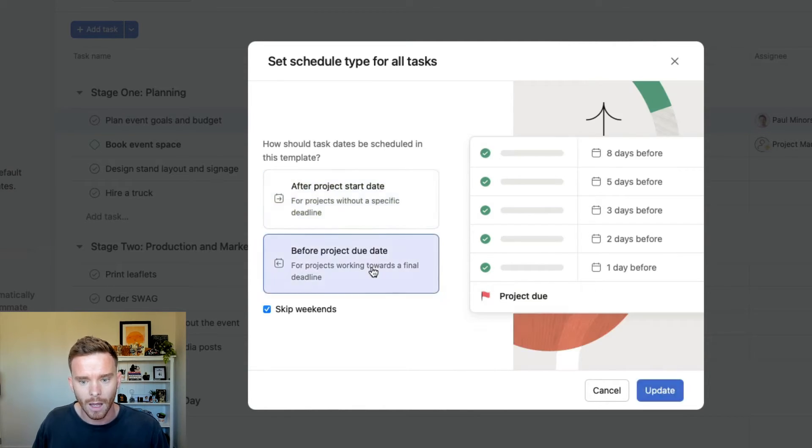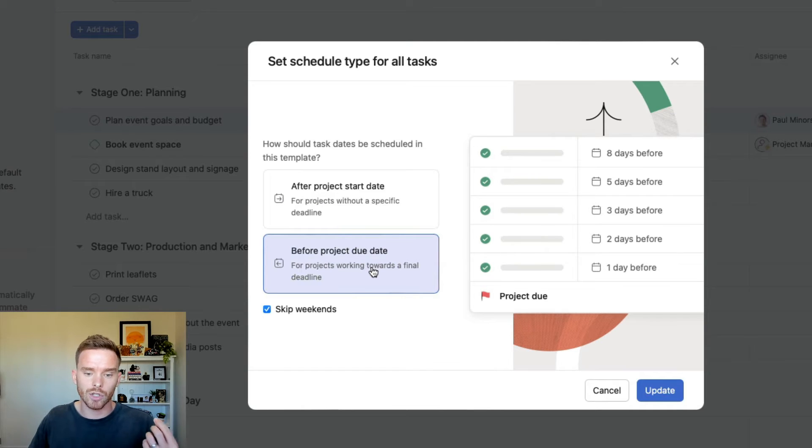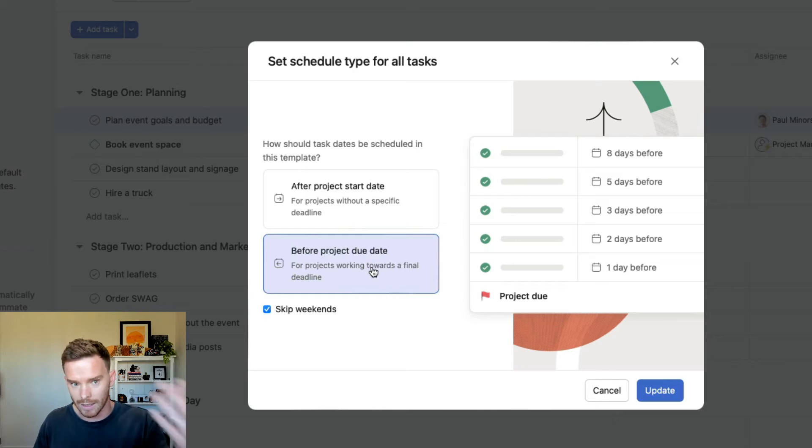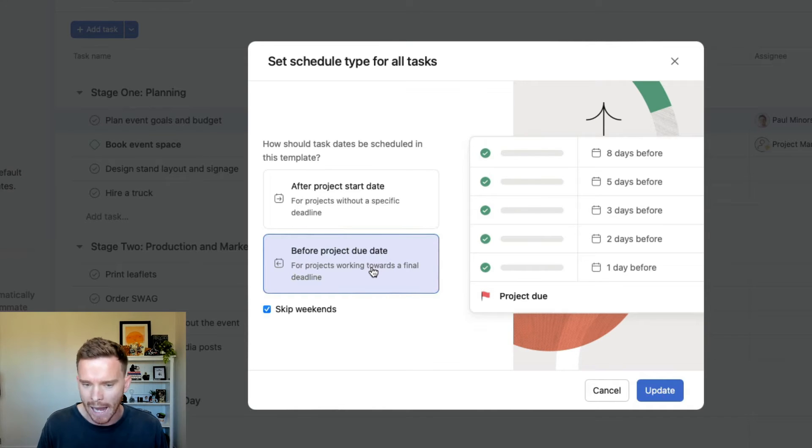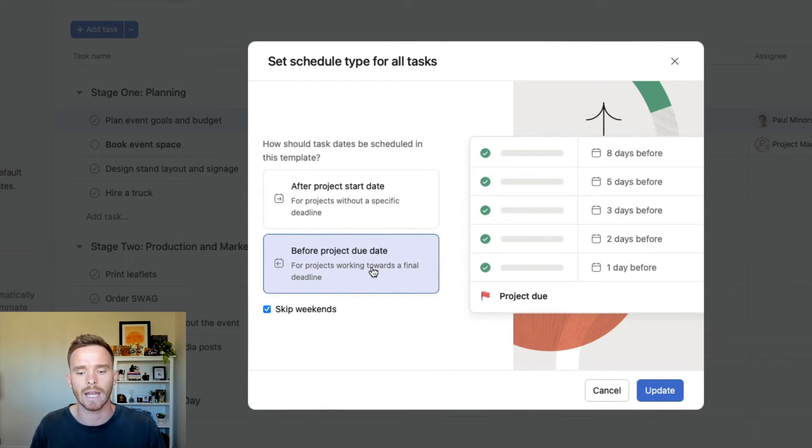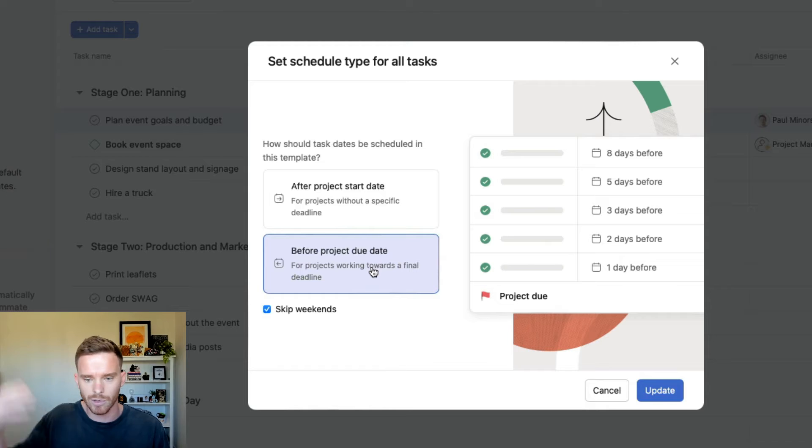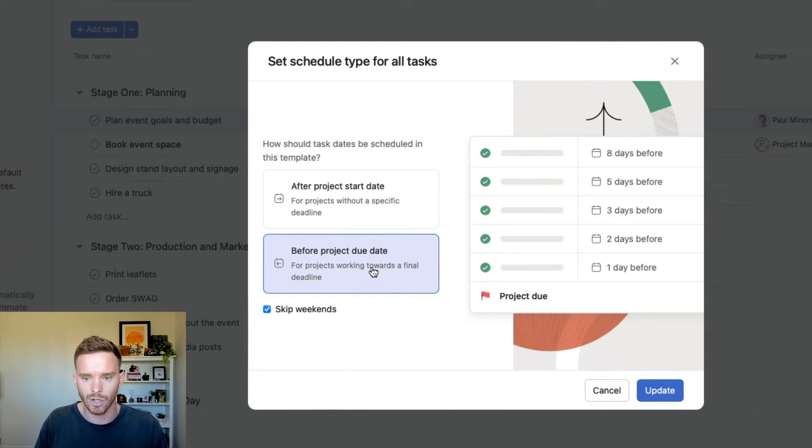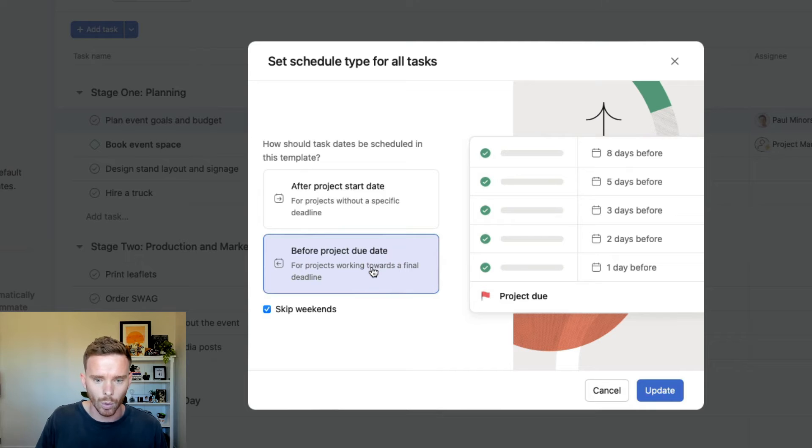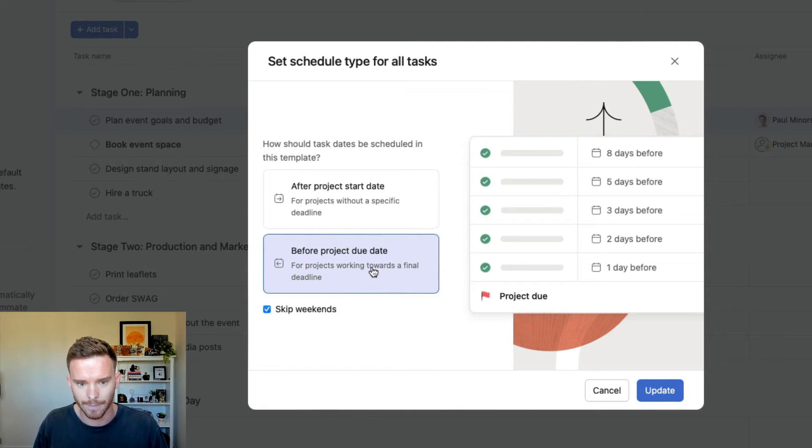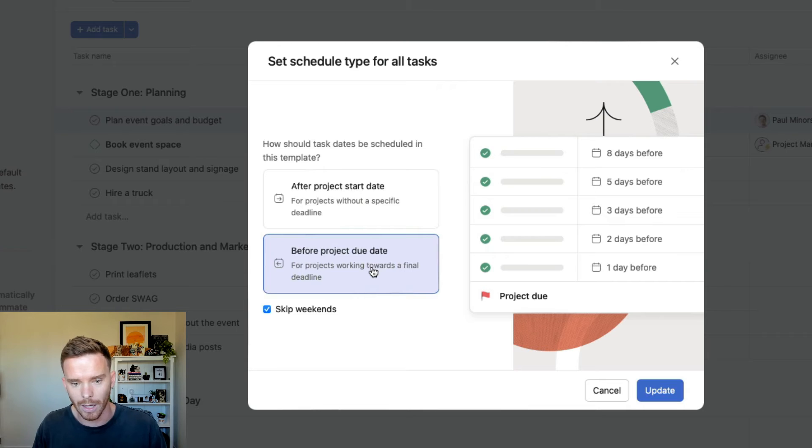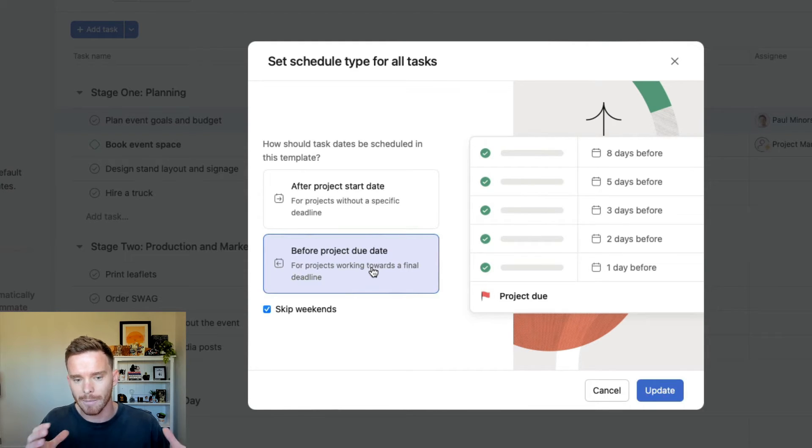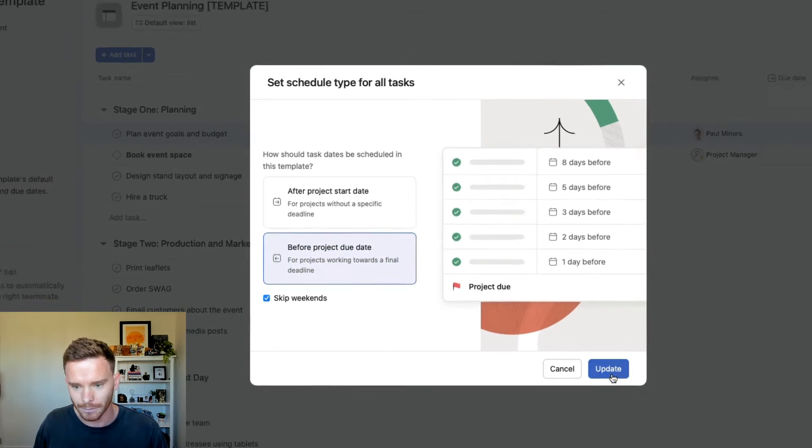Or I can have tasks be due corresponding to the project due date. So this is better for things like event planning, where you're kind of working backwards from like a launch day or some due date in the future. And now I can say, right, this task is due X number of days before the due date of the project. So in this case, I'm going to say, right, the event day itself, that's going to be my project due date, and I'm going to base everything off of that.